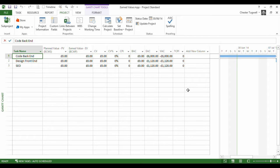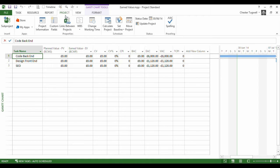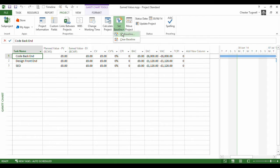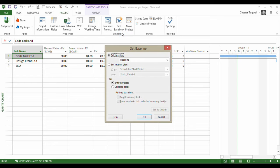Now there's a couple of things you need to do before you can use the earned value table, and one of those is to set a project baseline. Now a baseline is a capture of your start and finish dates, your work and your cost values. Very easy to set a baseline - you just go to your project tab, go to set baseline here, and you set a baseline.